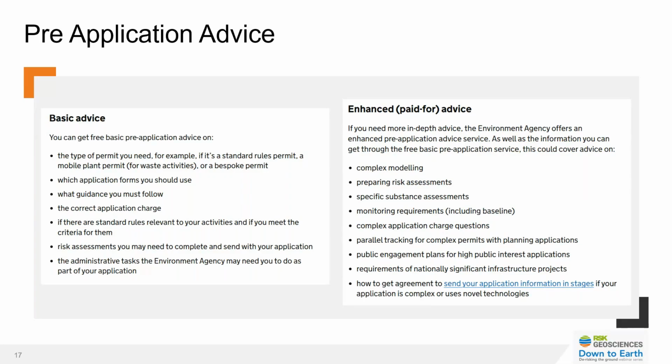Enhanced advice is a more detailed chargeable service, which the regulators currently charge at £103.80 plus VAT. And this will provide in-depth site-specific guidance, with most requests being completed in 10 hours or less. Generally, the regulator will contact you to agree a maximum cost. And involved in enhanced pre-app, this may include one-to-one meetings with regulators, tailored feedback on the proposed activities, and a bit more guidance and help with regards to complex or unusual scenarios.